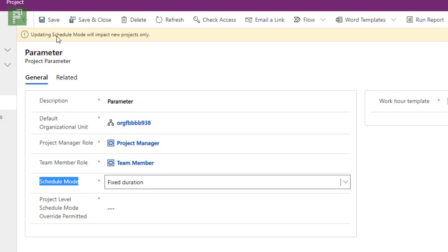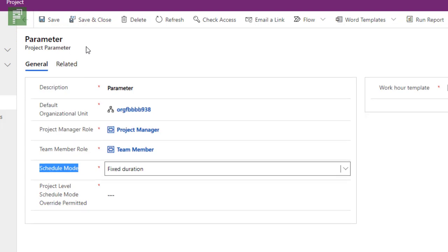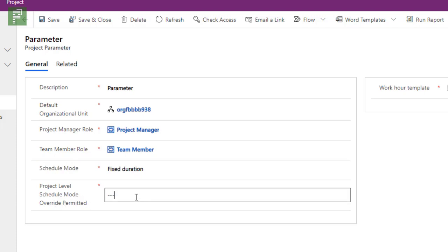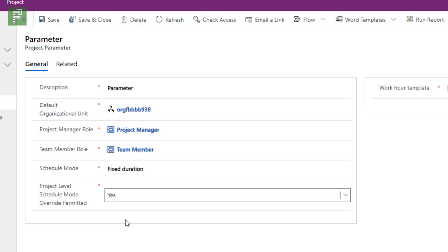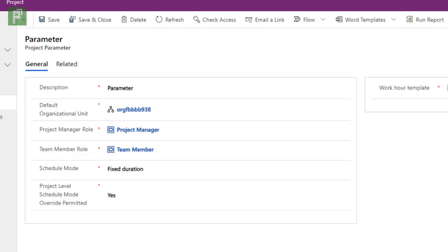For now, I will set that to fixed duration. Updating scheduling mode will impact new projects only. Be aware of that, that the timing of choosing the scheduling mode is very important here. And then there's a second one project level schedule mode override permitted. This gives you the option to actually tell people that they can override something specifically for their schedule. Clicking on save, now I have a fixed duration scheduling mode.